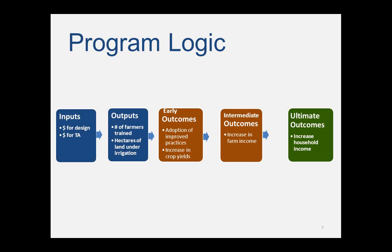When we look at this program logic in terms of how projects work, the first two boxes are project inputs — money spent — and outputs, such as farmers trained or hectares of land under cultivation. The program logic lays out how we expect these inputs and outputs to translate into outcomes. Some outcomes are triggered early, like adoption of new techniques, while others come later, like increases in crop yields. MCC tries to connect the dots to the ultimate outcomes we aim to achieve: increases in farm incomes and ultimately changes in household incomes.